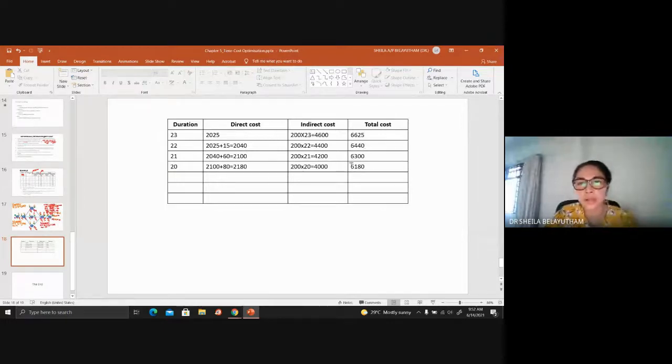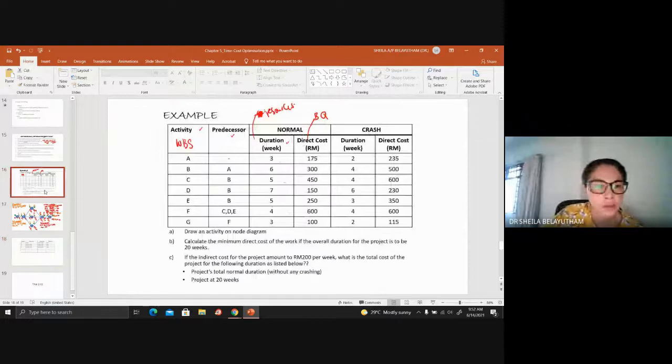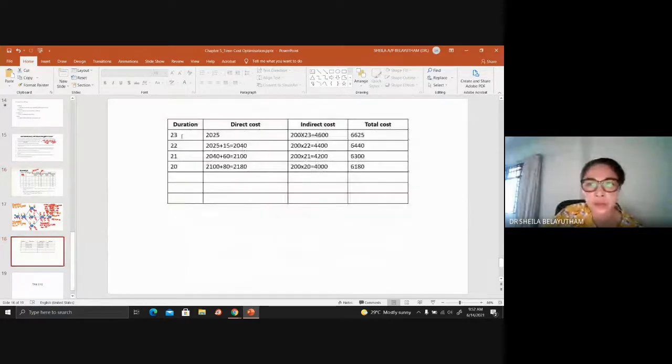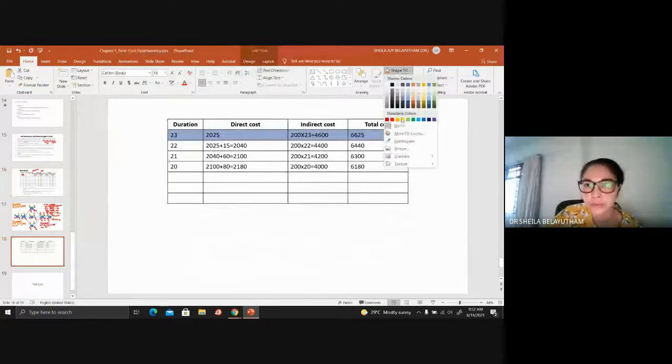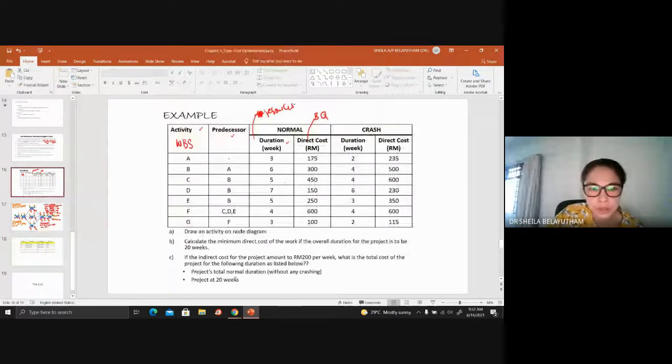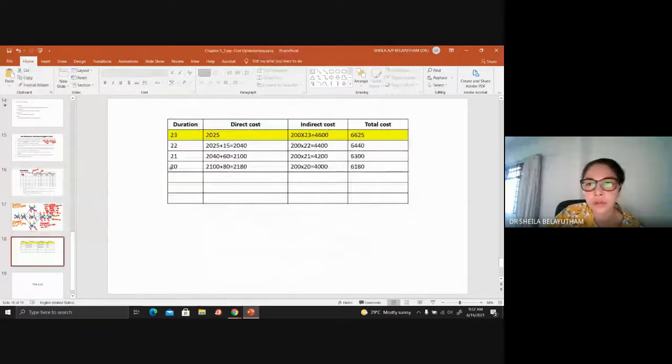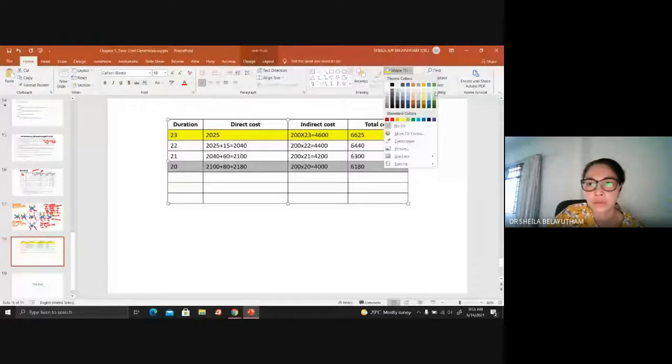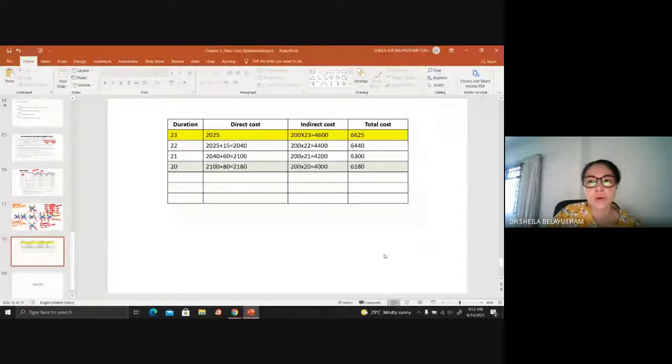21 is 6300, and duration of 20 is 6180. Okay, so to answer the question, what is the total cost for the duration? Normal duration, this is the normal duration. Your total cost is 6625. Okay, and at the project 20 weeks, your total cost is 6180. All right, so basically that would answer the question that is being given to you.